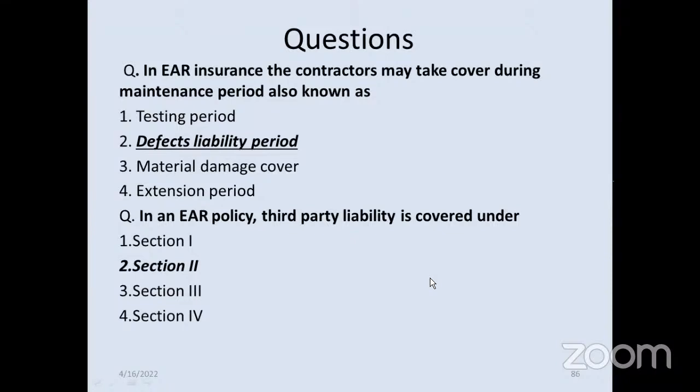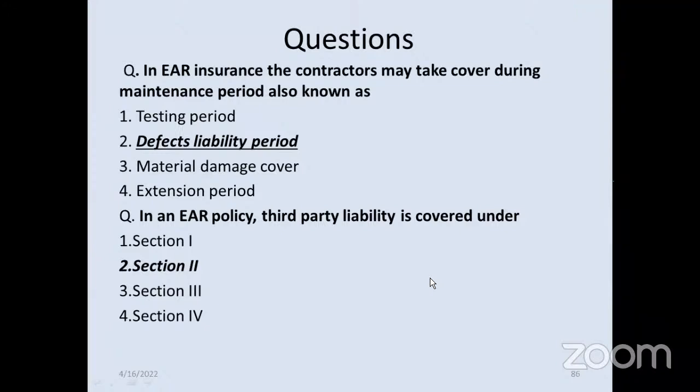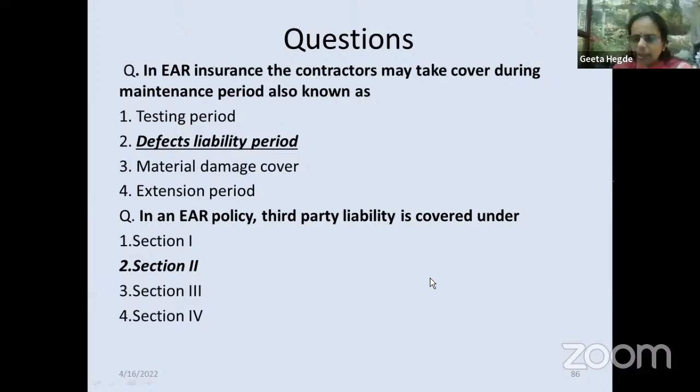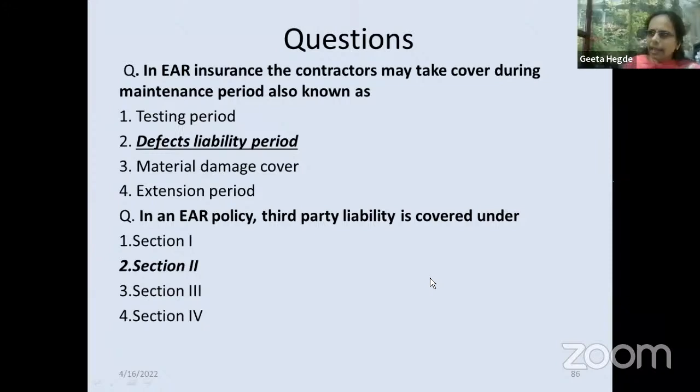Ma'am, one doubt. In CAR policy, is defective workmanship covered? Defective workmanship is not covered, but the defective workmanship will result into some loss. That is covered. But defective workmanship का जो portion है, उसका rectification will not get covered. So all these exclusions जो होते हैं, exclusion के resultant damages will get covered.